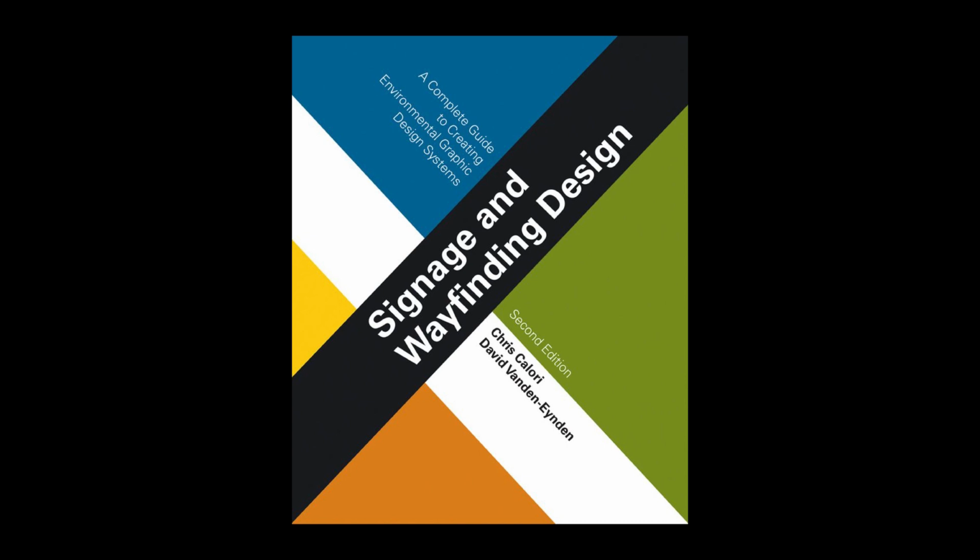The actual fabrication contract is a legal document that consists of many more general contractual items than the signage specs, including terms and conditions, often referred to as boilerplate or upfront conditions, bonding requirements, and others. Thus, the specs that are concerned solely with the product to be constructed, that is signage, are termed the technical portion of the specs.